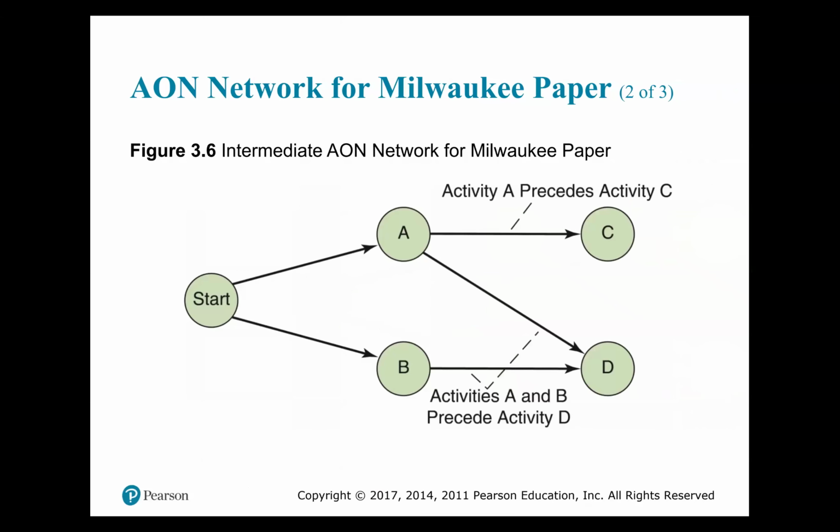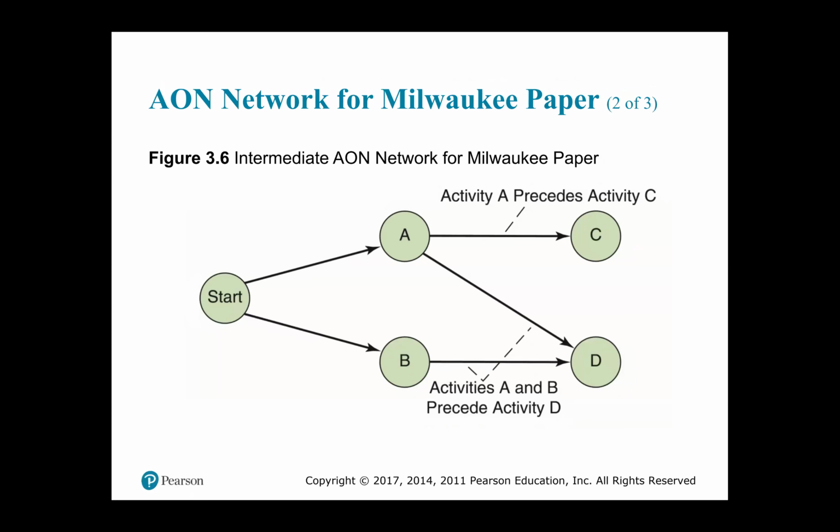So now, having done activity A and B, if you look at your document again, you'll see that across from activity C, you will have activity A under the immediate predecessor column. What that means is that having accomplished activity A, you can now go on to accomplish activity C. So we say that activity A is the immediate predecessor for activity C. And here is activity C, right?